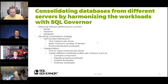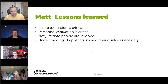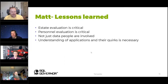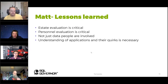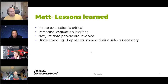Matt, would you like to tell us some of the lessons learned? Yeah, we probably don't have time for all of them. Number one: make sure you're evaluating the entire estate that you're going to migrate and do that as early as possible. This may not be significant if you're just migrating databases on a single server to Azure, but on larger corporate projects the scope of migration wasn't identified up front, which provided real challenges.